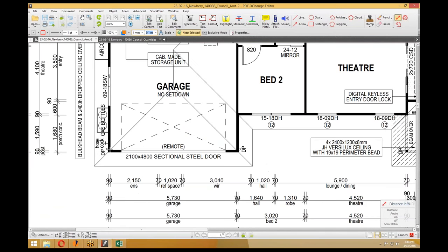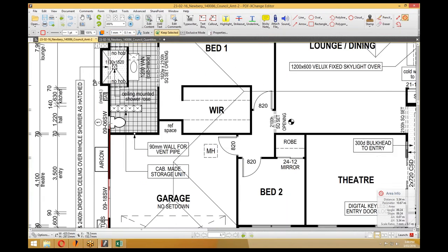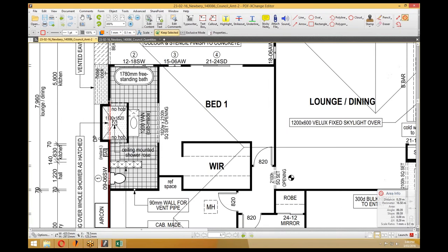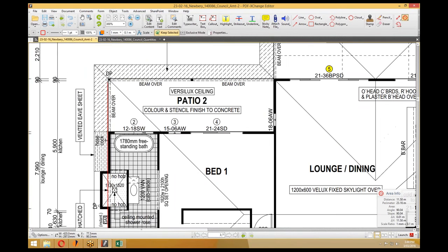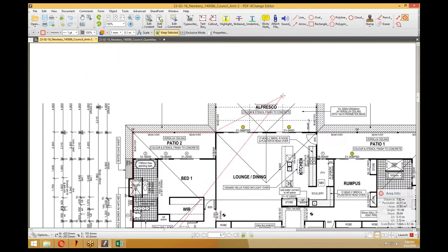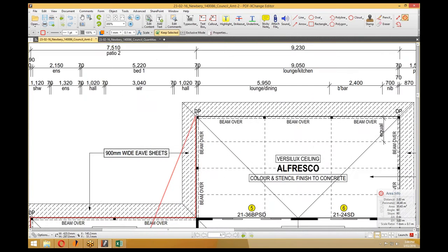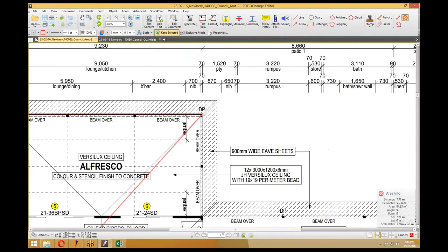Now we want to measure the short edge, or even the area tool may be easier because it'll automatically snap back to itself when we're done. So we just want to follow the short edge of the eave all the way out and around, and then we'll pick up the extra area by calculating the external corners.